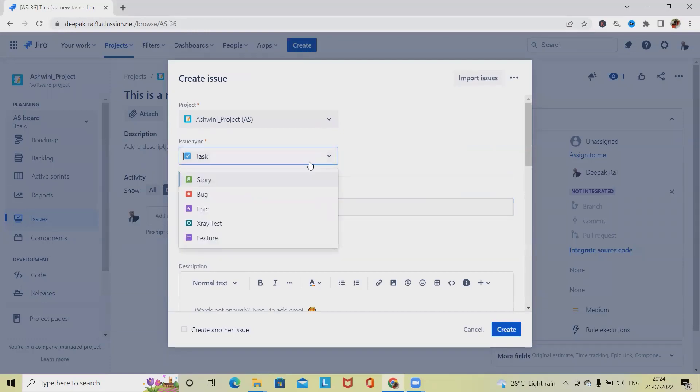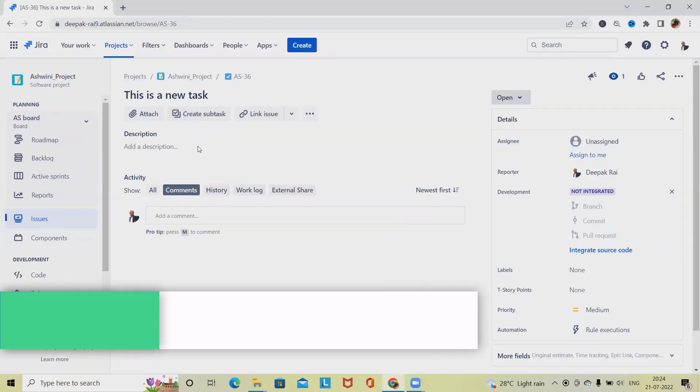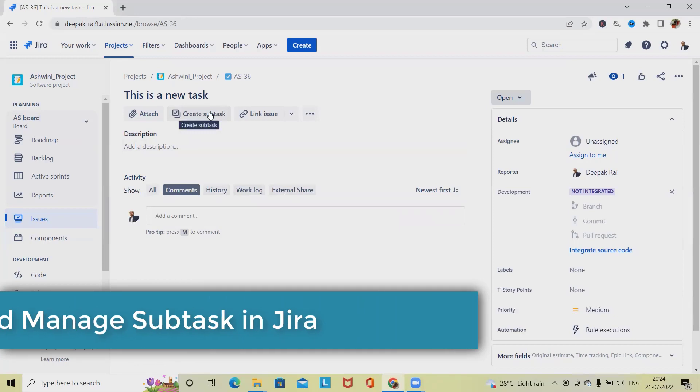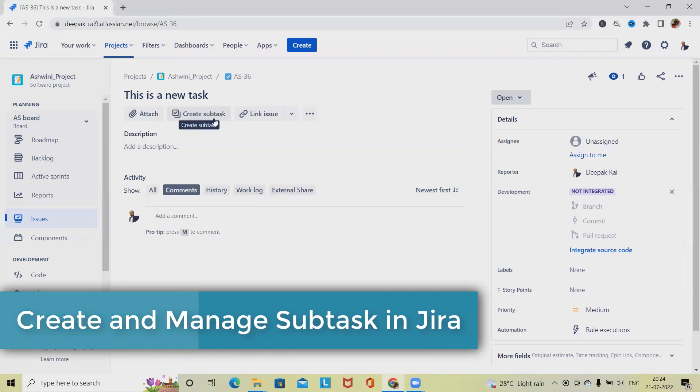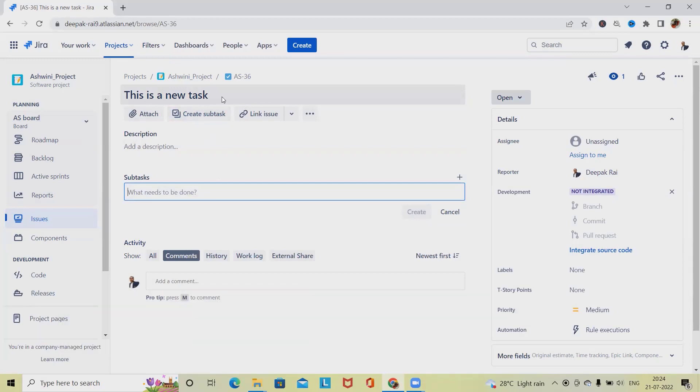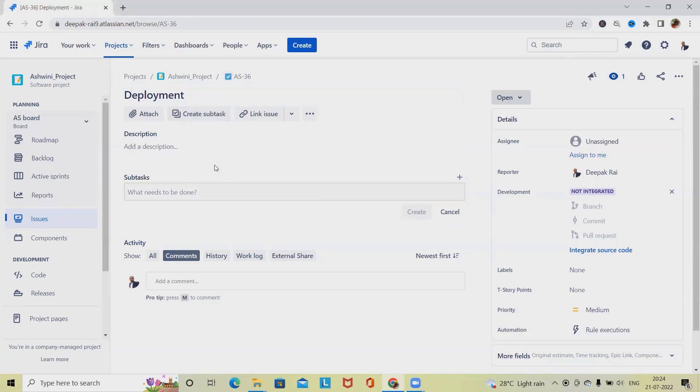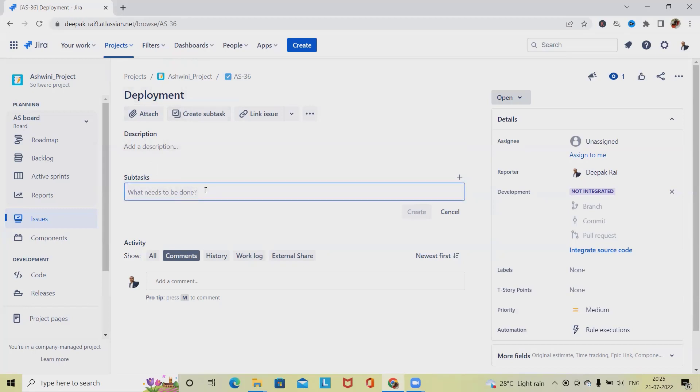Generally when we select tasks, story, bug, and all these components, we can also access this subtask from here as well. But right now we have created tasks and we are going to divide them into small subtask activities. Let's consider this task is created for deployment. For doing the deployment, a single person or multiple persons might be involved, so generally they are following different structures. Let's consider this deployment can be carried forward in three different servers.